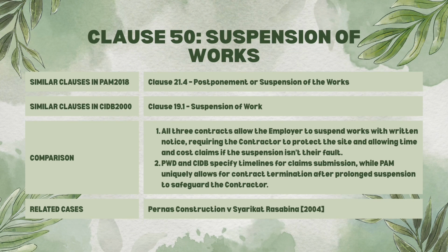Next is suspension of works. PWD Clause 50, PAM Contract Clause 21.4, CIDB Clause 19.1. PWD and CIDB outline specific timelines for submitting claims, while PAM includes a provision for possible contract termination after prolonged suspension. So, the case that is related to this topic is Pernas Construction versus Syarikat Rasa Bina 2004.